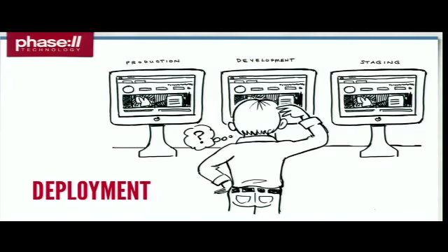So you're going to need to direct your content people at a specific environment that's dealing with just content. You're going to have some kind of a staging or maybe an integration environment for your developers. And of course, you're going to have production, which is going to be a sacred place. Understanding what these different environments are, how they're used, how they're procured up front, and educating your whole project team on how to use them effectively is a really important part of limiting the friction on the project.